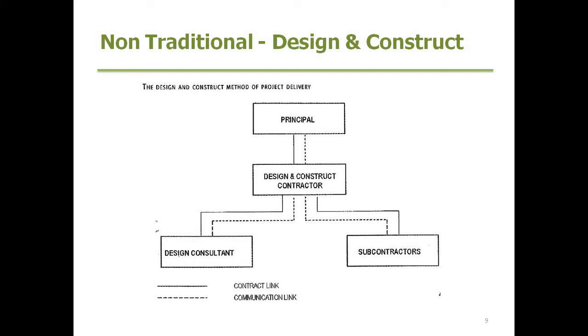The agreement has really been brought about by clients' dissatisfaction with relationship arrangements and timing of traditional projects and other forms of non-traditional projects. So it has been otherwise and it is otherwise known as performance-based contracting, and you can see that the shift or the risk moves more towards the contractor here. So compared to traditional, there's no buck passing between the architect and the builder.